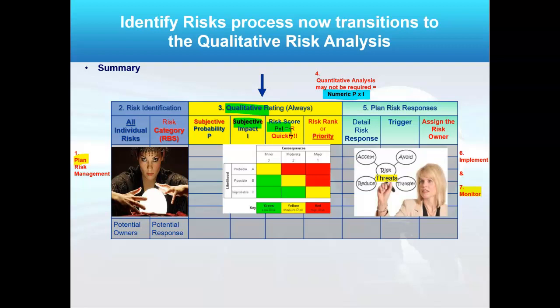Your team's an expert, so it's fast, but you've got to put things in priority. Running out of water when it's a two-hour job in 45-degree weather is not the same risk as working in the center lane of a highway putting out cones so that you can do some construction or replace a light bulb in the overhead lamps of the project. You have to prioritize those risks.